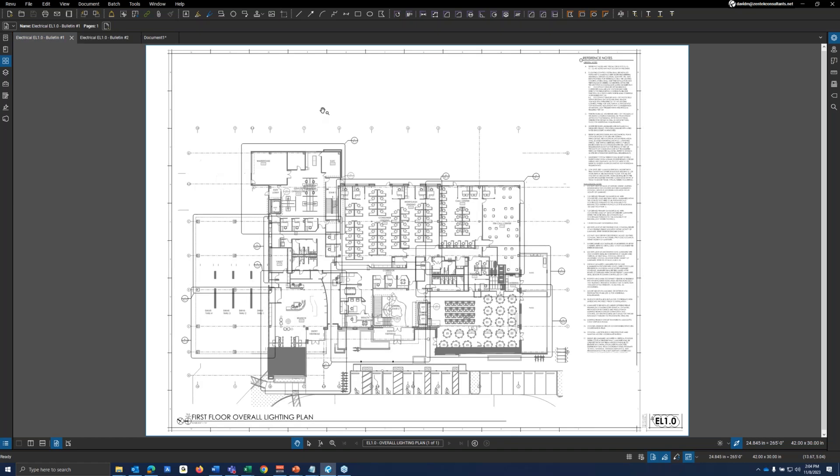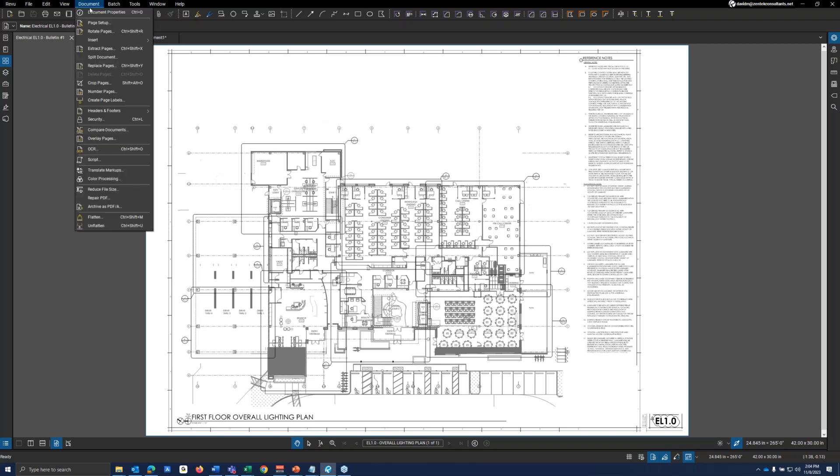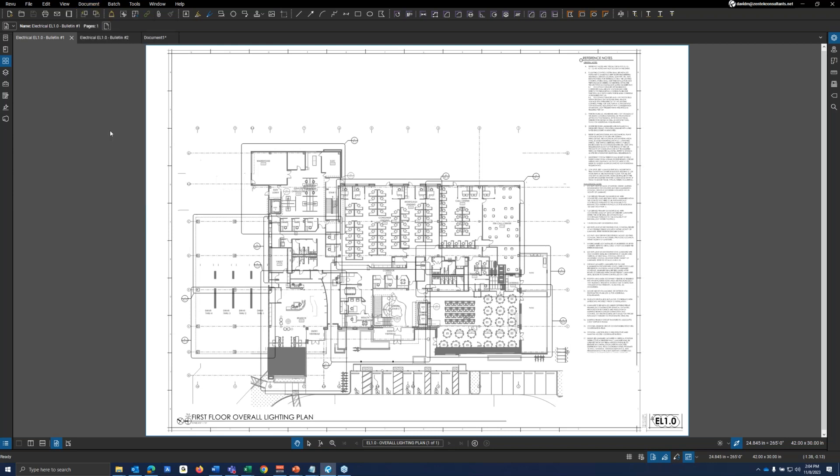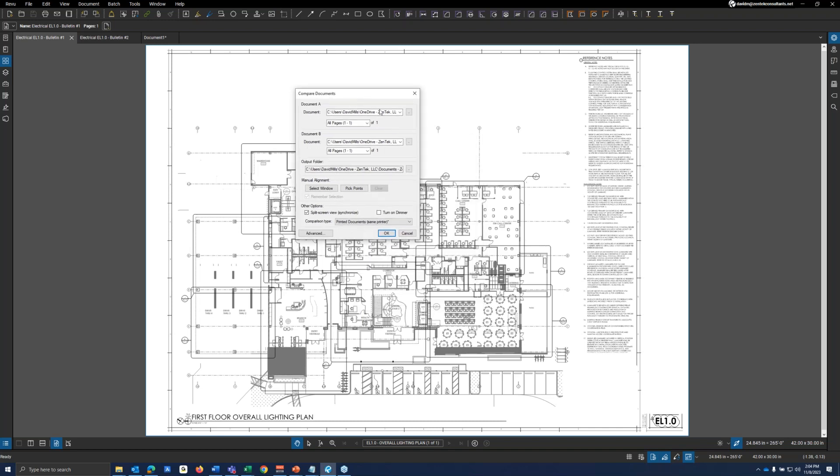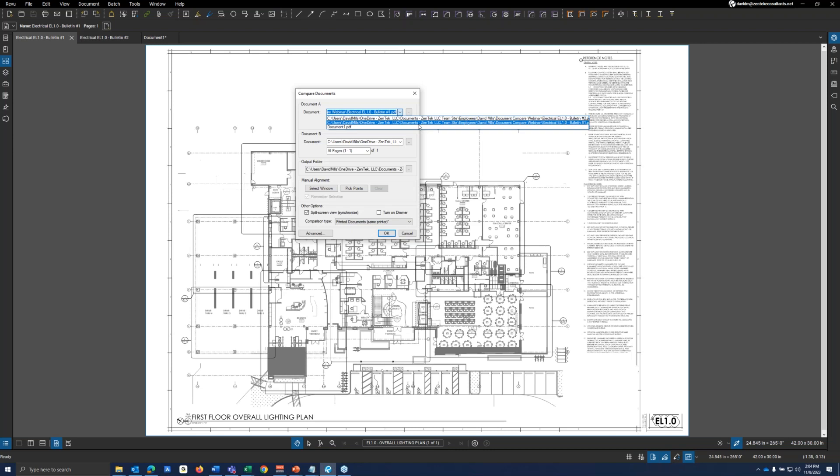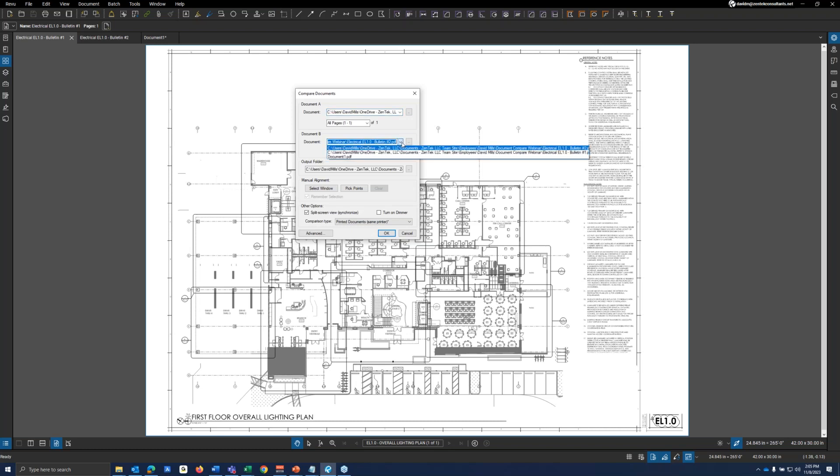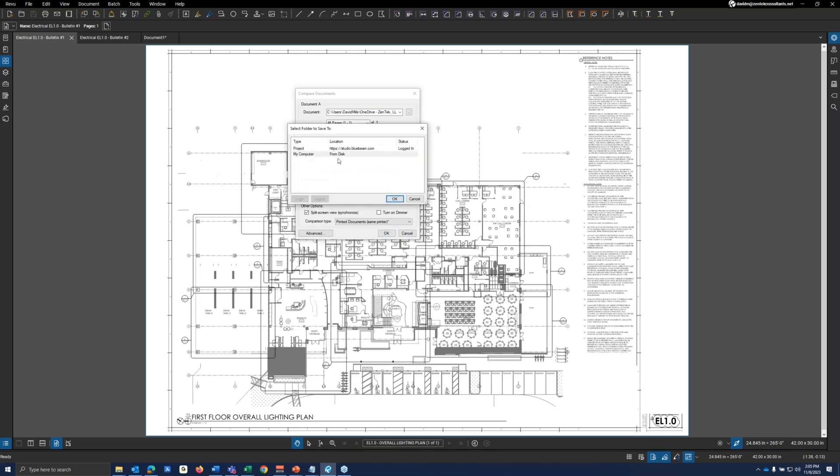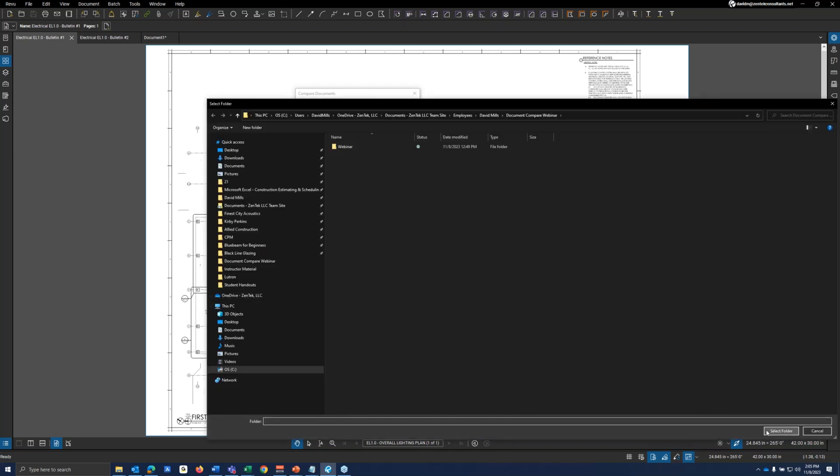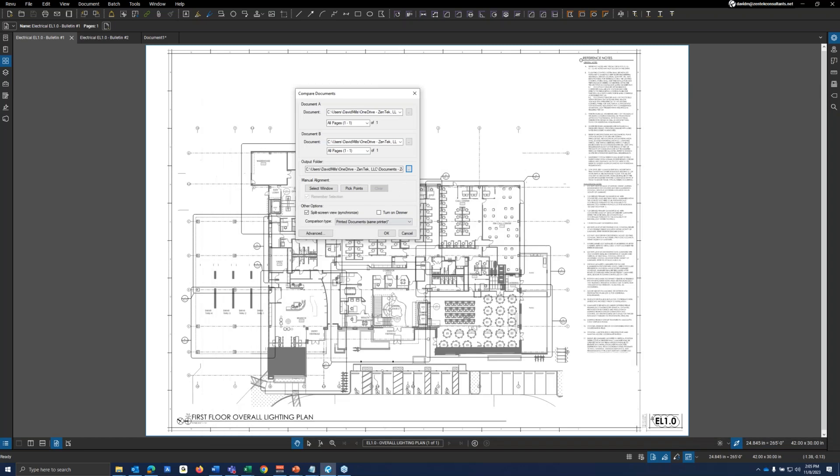So the easiest way to do our document compare is if you go up to document right up here. And about halfway down, we do have our compare documents. And all it is, is simply clicking whatever our first document is. So I'm going to be looking at document, my Bulletin number one here. And Bulletin number two is going to be my document number B. We could change this saved location because what Bluebeam does is it'll actually make a new document all together with those red bubbles on them that we are familiar with. So I just want to make sure this is being saved in the right location.